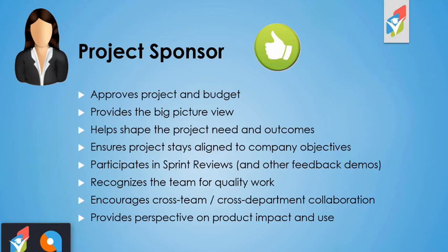From a ceremony perspective or an Agile meeting perspective, the project sponsor isn't expected to go to all the various ceremonies on a sprint basis. Instead, the big ones that they should be participating in are the sprint reviews or other feedback demos. Now remember, the sprint review is where the team is demoing what they've completed as part of that sprint.